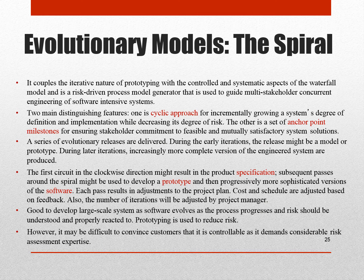Evolutionary models in terms of the spiral model: it couples the iterative nature of prototyping with the controlled and systematic aspects of the waterfall model, and is a risk-driven process model generator used to guide multi-stakeholder concurrent engineering of software-intensive systems. Two main distinguishing features: one is a cyclic approach for incrementally growing a system's degree of definition and implementation while decreasing its degree of risk. The other is a set of anchor point milestones for ensuring stakeholder commitment to feasible and mutually satisfactory system solutions.